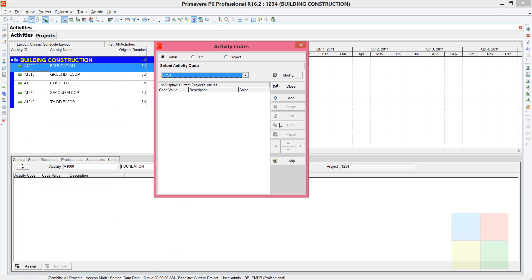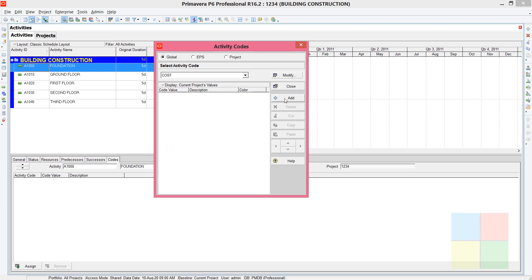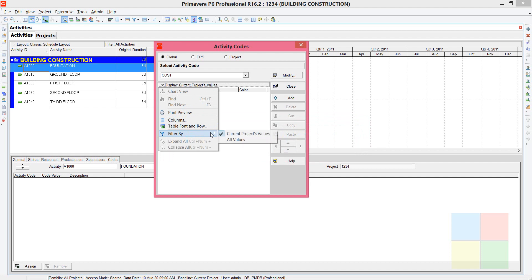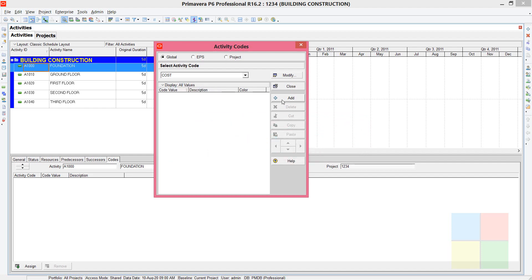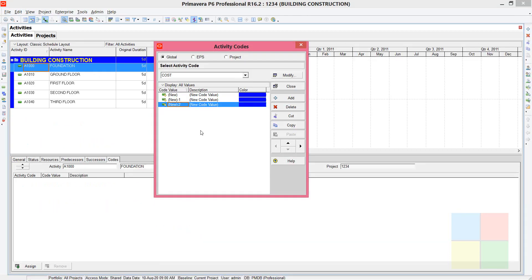Go back to the software. Before clicking Add, note the Display option — 'current project values' is selected by default. Change it to 'All Values'. If you don't change it, a warning message will appear when you click Add. Once changed, click Add three times.